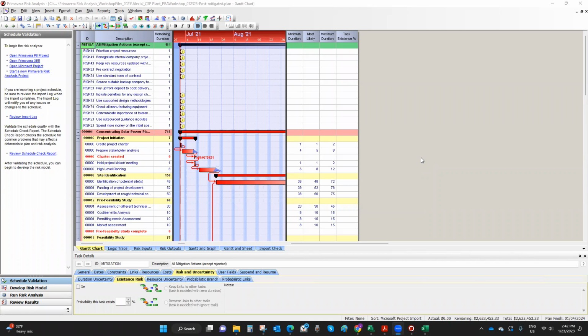Remember, when you identify a risk with an impact of 5 days, based on the probability of the risk to occur, sometimes that 5 days may be added to the part it is associated with in the project, or sometimes it will not. Just like task existence probability, that's the same thing.